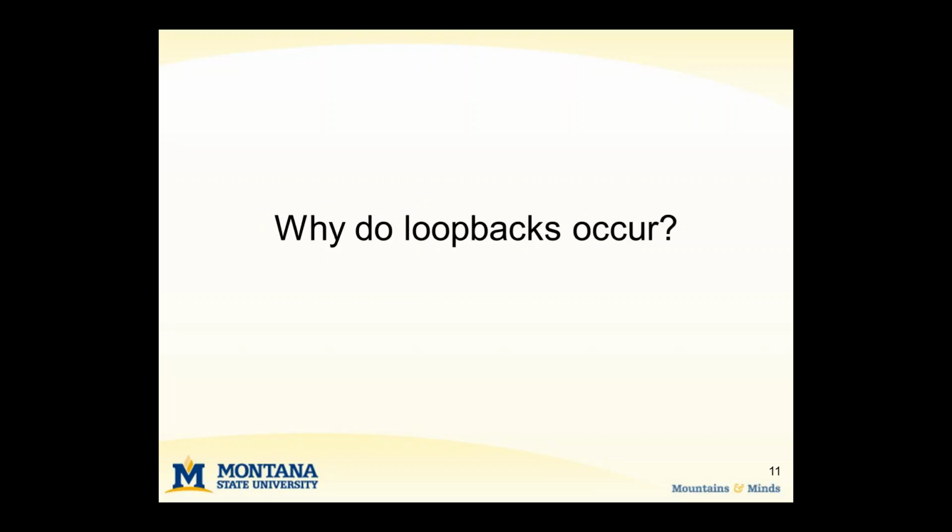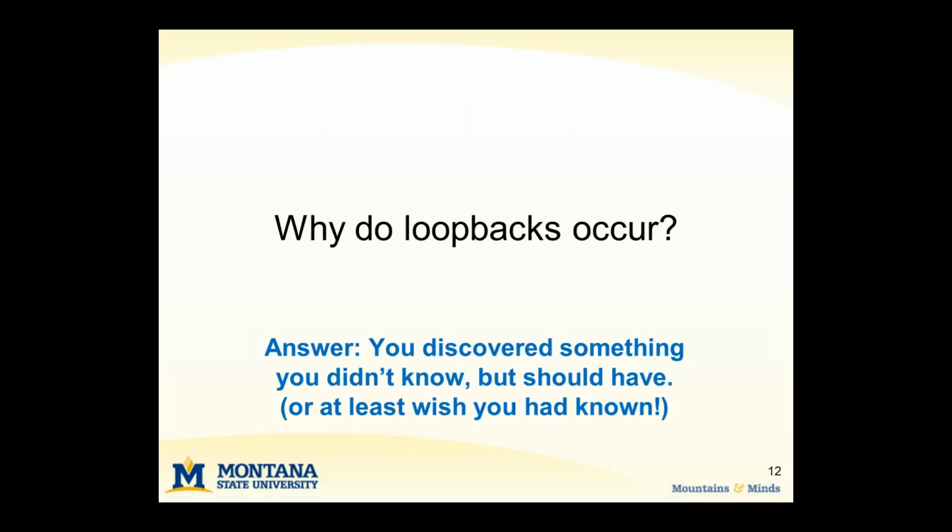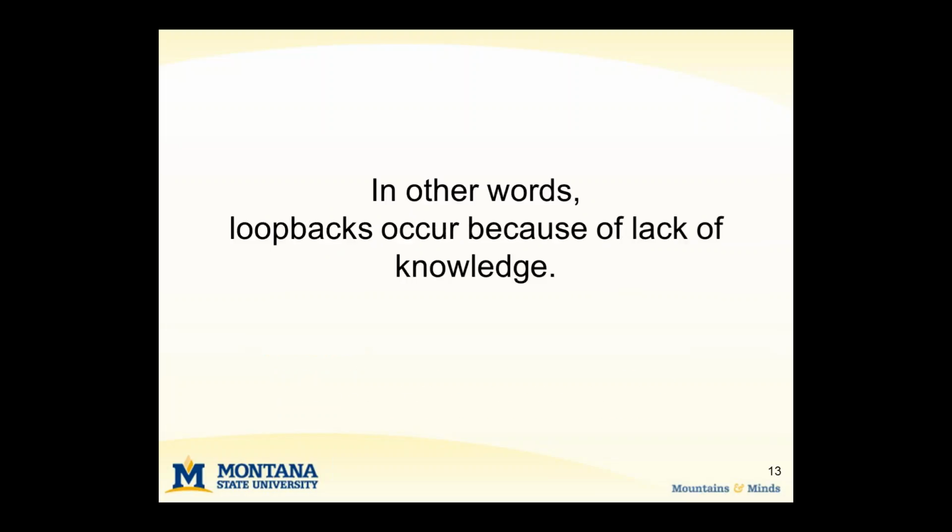So why do they occur? And there might be lots of reasons why they occur, but a lot of those reasons come back to a basic idea that you learn something later that you didn't know earlier, and had you known that information, you probably would have done things differently. So fundamentally, loopbacks occur because of a lack of knowledge. If we can get that knowledge earlier in the process, then hopefully we can make better decisions that we don't have to revisit later in the project.